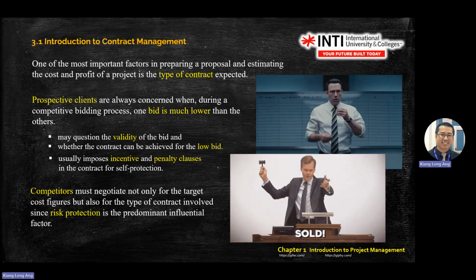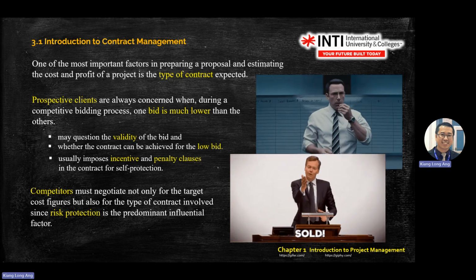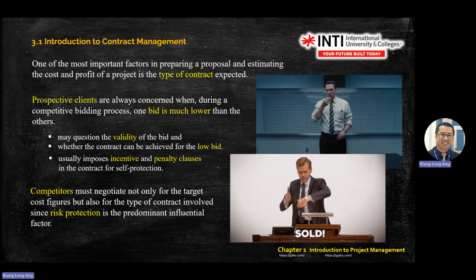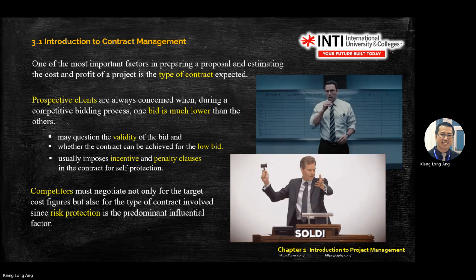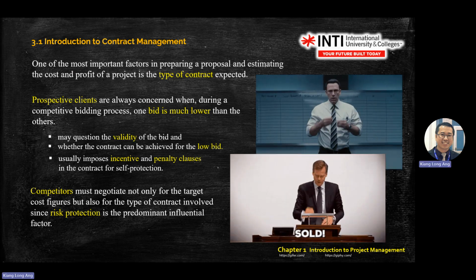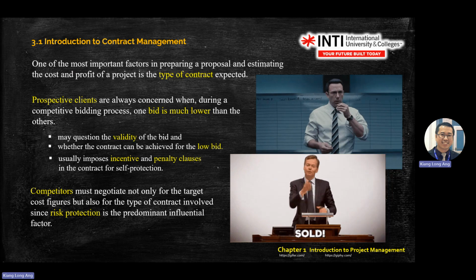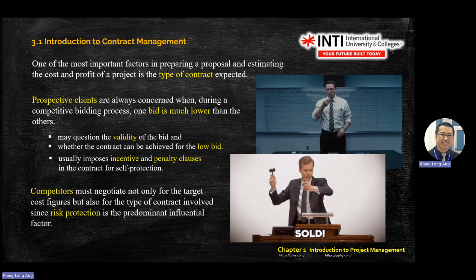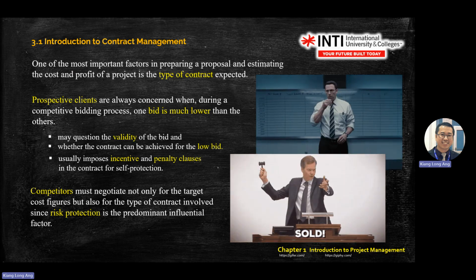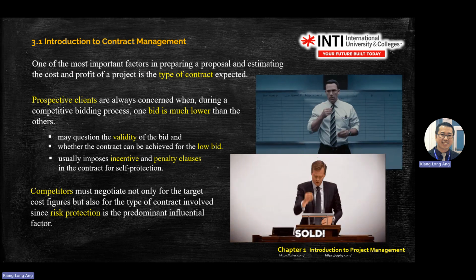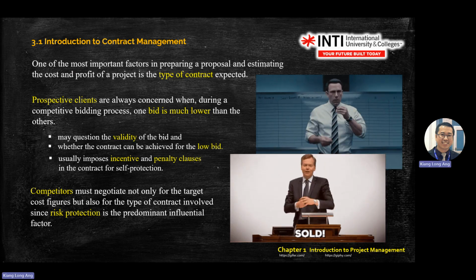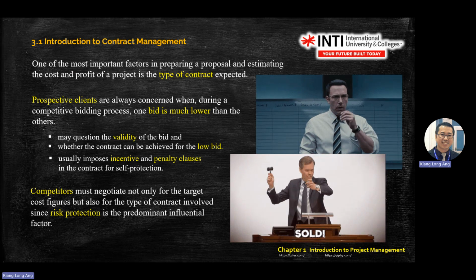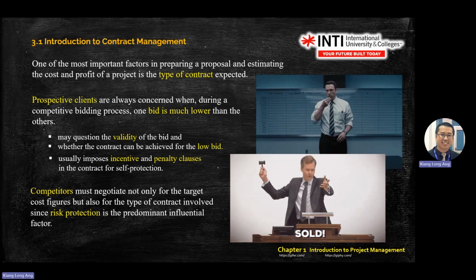Everything I calculated very tightly. Okay, my production floor needs 3 weeks. So I was very stupid, I told my customers we need 3 weeks. But something happened at the production floor, there was a delay. Because of the production floor issues, there was a delay of 2 weeks. The penalty in the agreement actually mentioned 1 day, 3,000.